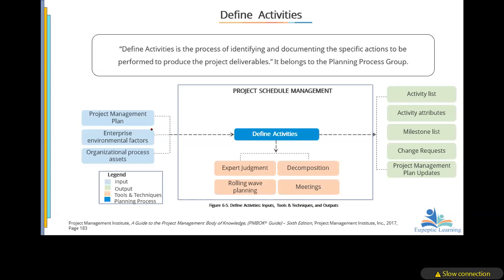Then, what are the tools and techniques? Expert judgment and decomposition. Remember, we did some decomposition in the WBS, and based on the WBS, we can actually come out with the activities. That is why there's a relationship between the WBS and what we are doing here. And these activities provide the basis for estimating, scheduling, executing, and monitoring and controlling the project work.